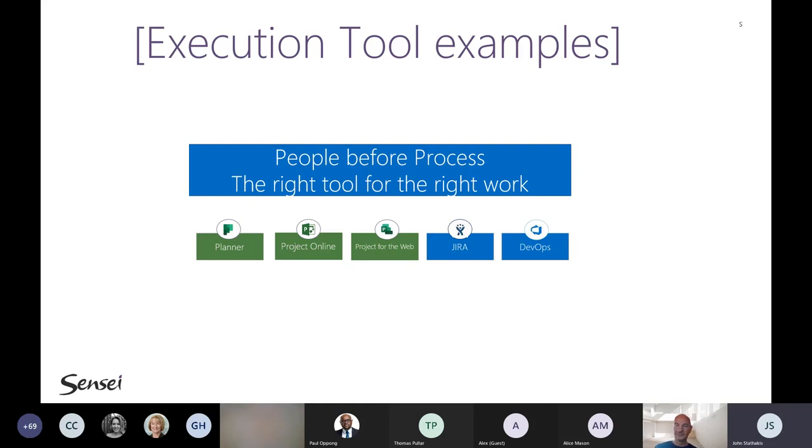The second thing is where you have a reasonably short-term delivery schedule where one needs to have certainty on the scope that needs to be delivered for a particular deadline that has a business impact if it's not delivered on that specific day, and where you can have some variability of scope, you can't go beyond a certain minimum level. And I think the one minimum level you could have there is if you're doing a system replacement, then the baseline requirement for that is a like-for-like replacement. We don't want to go backwards in terms of the functionality that needs to be available.